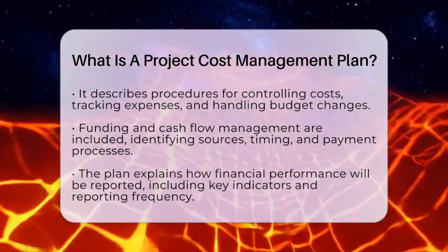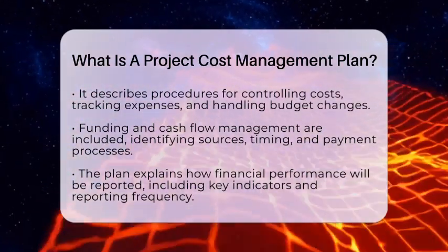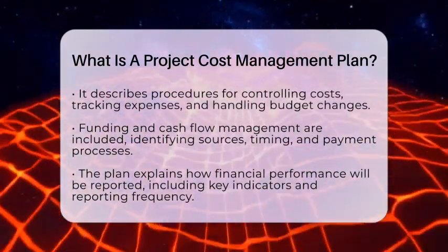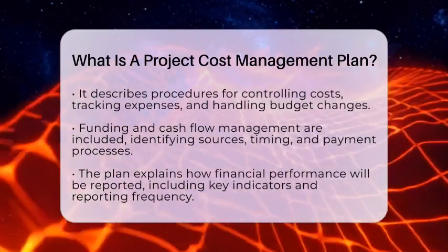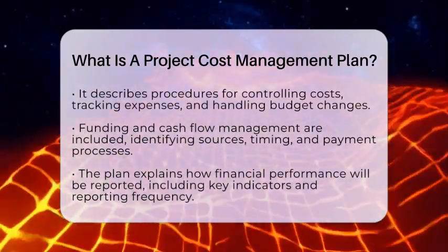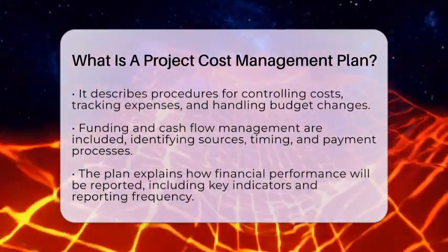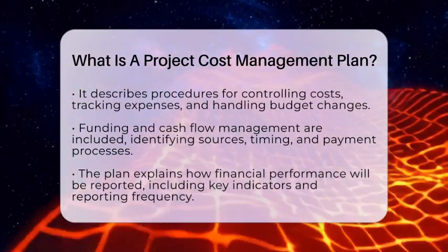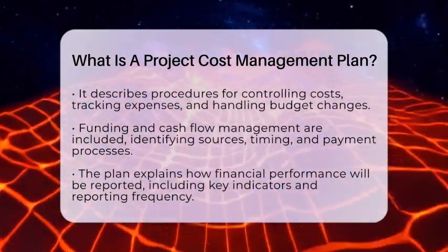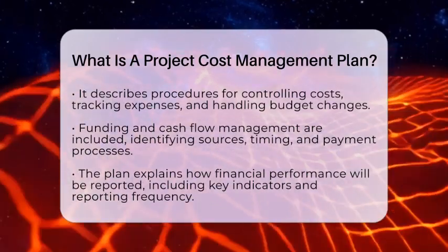Funding and cash flow management are also included. This section identifies where the money will come from, how much will be needed at different times, and how payments will be made. This is especially important when working with external vendors or contractors.